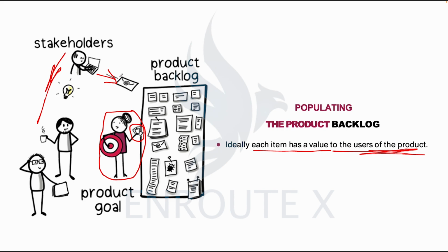requirements over to the product owner, right? I had mentioned in module 2 that every work item should come from the stakeholders to the product owner. It shouldn't go directly to the developers, but it should come through the product owner, so that the product owner would now stack all of these on the product backlog.